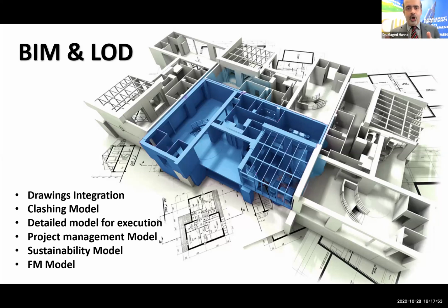Now, usually in this process, the work is executed, but the drawing has not been updated. And then at the end, they try to update it. A lot of the time when I do a project audit and I look for the as-built drawings, around 80 or 90% do not match the actual reality of the site. Why? It just looks like one of the requirements on your checklist. Yes, it's completed. We do it at the end of the work, which is not the right way.